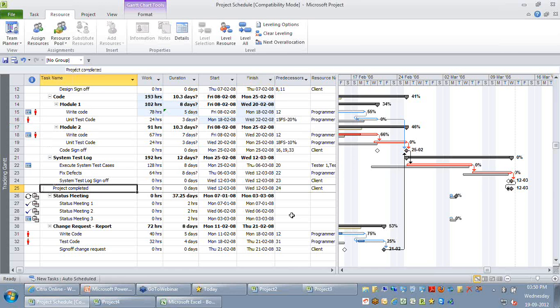But coming to a concept like prioritization of risk or running a simulation or a Monte Carlo, that is not available directly in Microsoft Project 2010. But there are third-party tools available like Risk Plus and @Risk. You can do a Google search on it. All those products are licensed products, not freely available. You can download a trial version through which you can run a simulation of this complete project, giving the three-point estimates for all these activities, through which you can know the favorable duration you need to commit on this particular project.